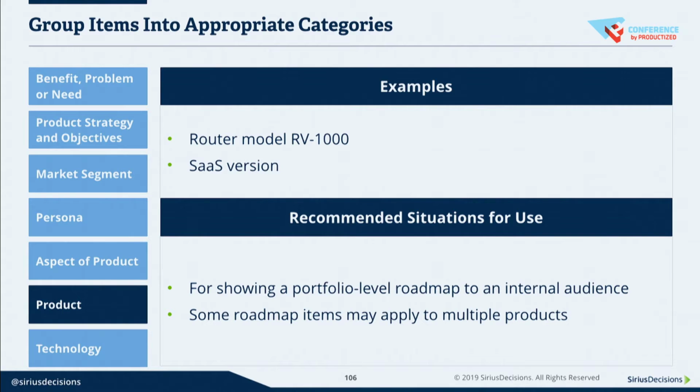So when I see teams that have lots of complexity and lots of platforms and shared services and things like that, they oftentimes want to have their roadmap documented this way so they can make sure that, if we're releasing this thing in June, we want to make sure that this other part is delivered in April so we can bring it to market.